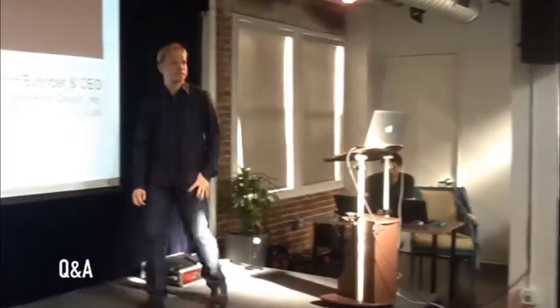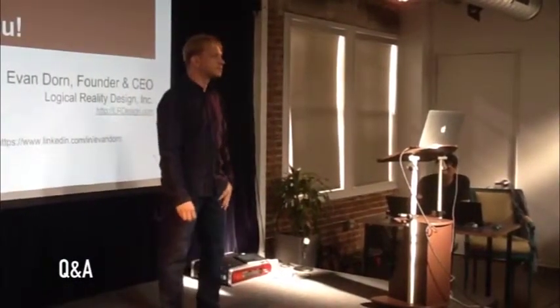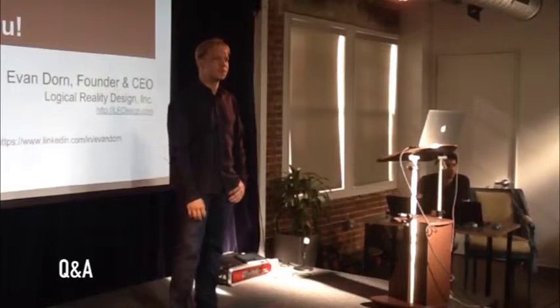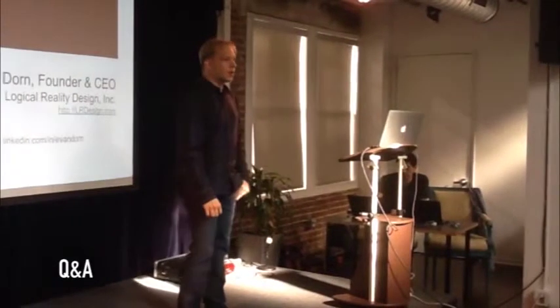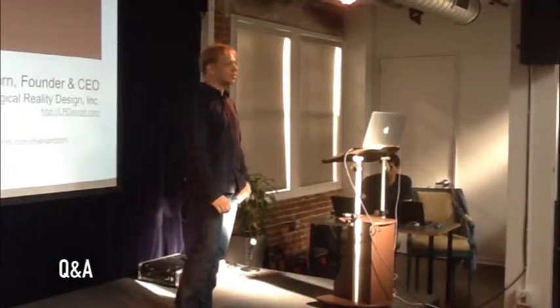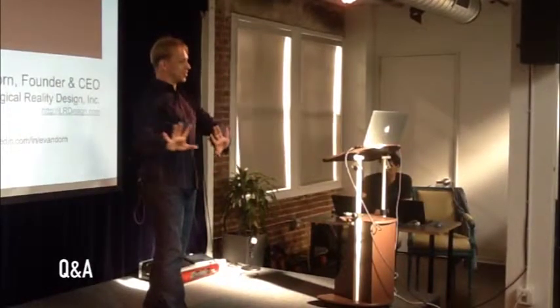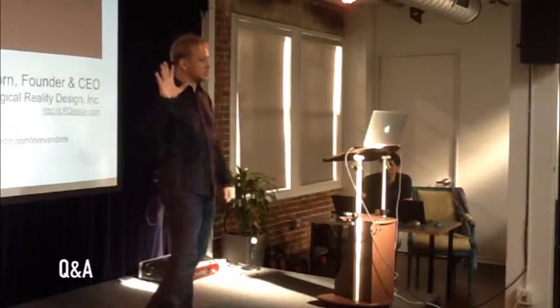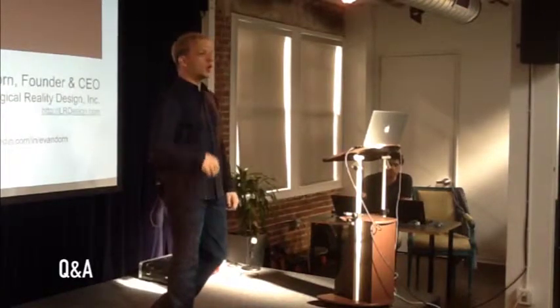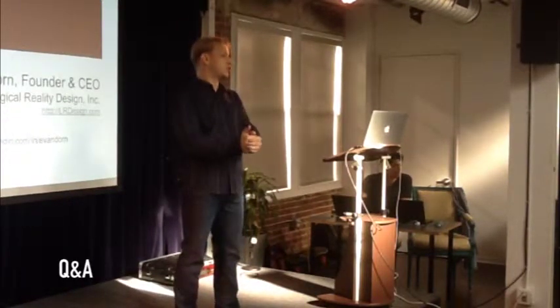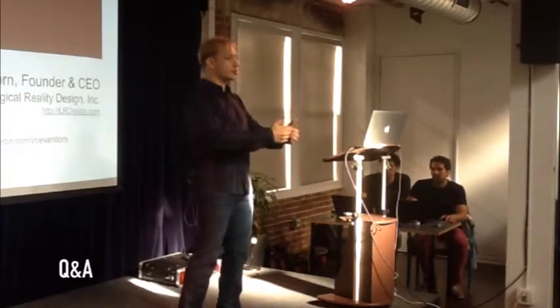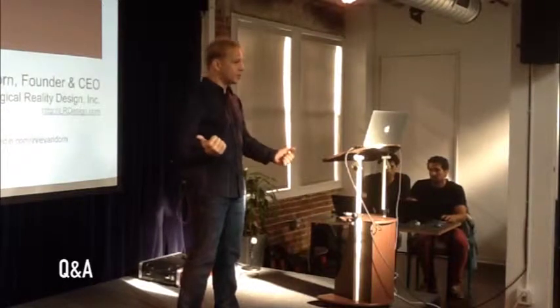So from a consumer point of view of development services, what about using the fixed price contract to reduce my risk on scope creep? That's going to be a negotiation with your developer, and I could do a whole different talk on incremental or hourly pricing versus a fixed cost. What you're going to find from a developer is that in order to give you a fixed cost, they're going to want a fixed feature set, right? Otherwise, all you're doing is offloading the risk of the scope creep to the developer, which isn't going to make them happy either.